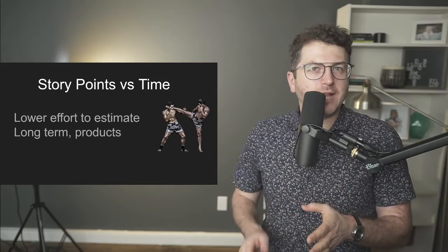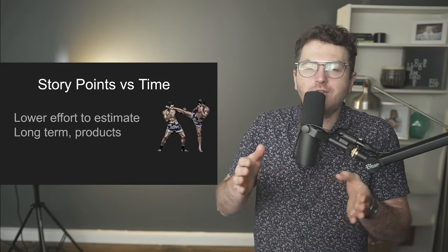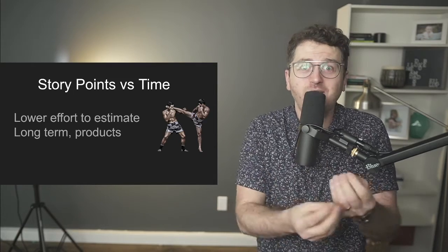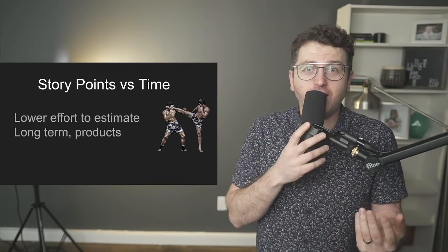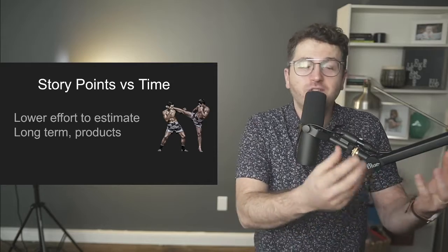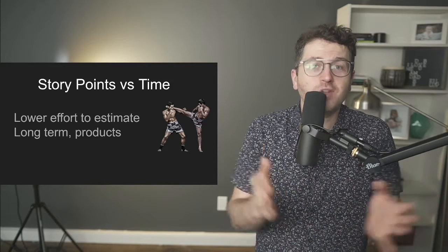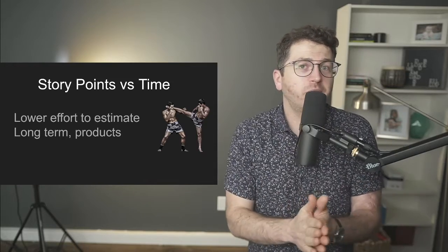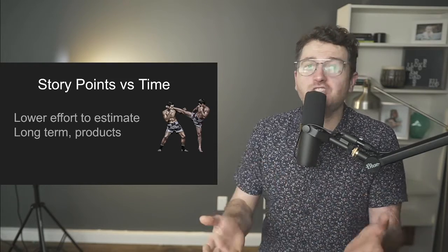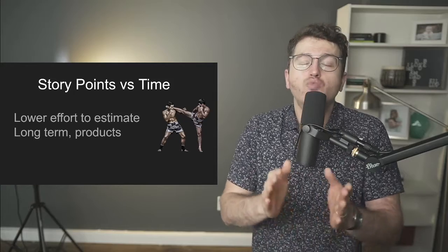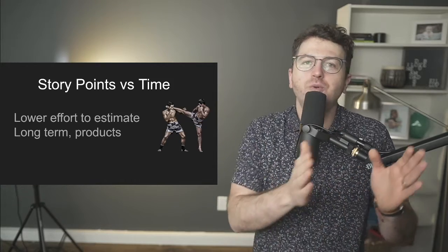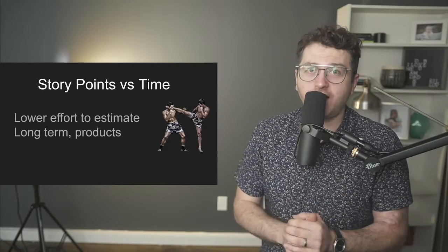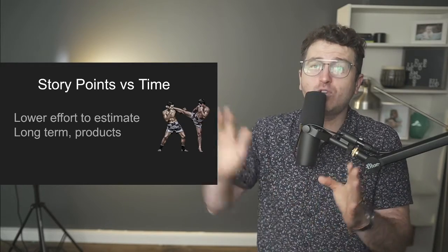Now, short term, like I said, when you have a very short project, your developers didn't even have the chance to get used to estimating in story points and assigning the same value to a feature of a specific size. So for a very short project, maybe for a team that is just working together for a short period of time, or where the composition of the team may change, it's way easier, way better to do it in hours, especially when you do time and material with a specific client, but not for products, not for long-term products, like I said.